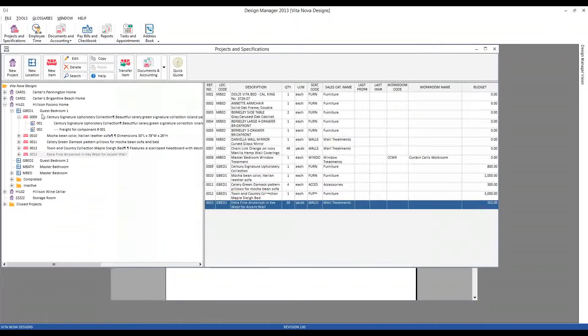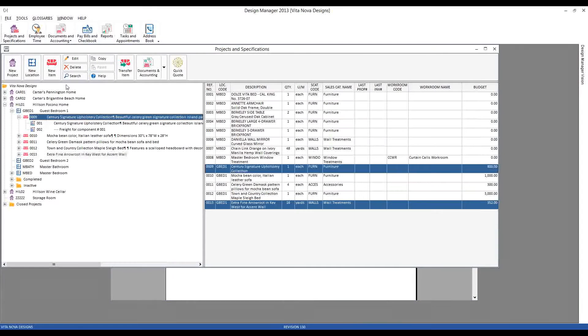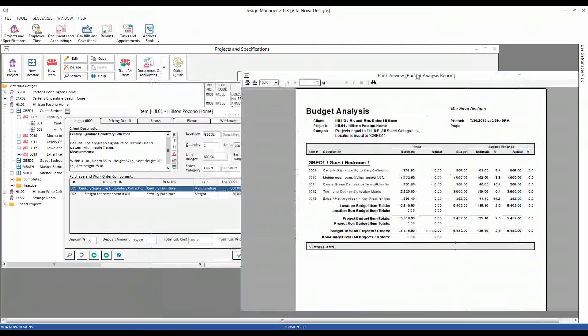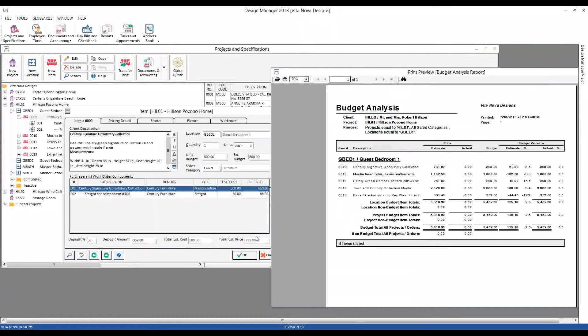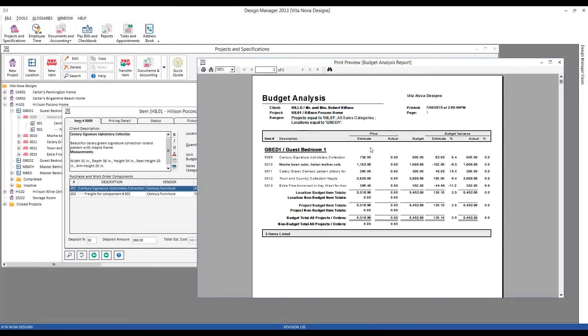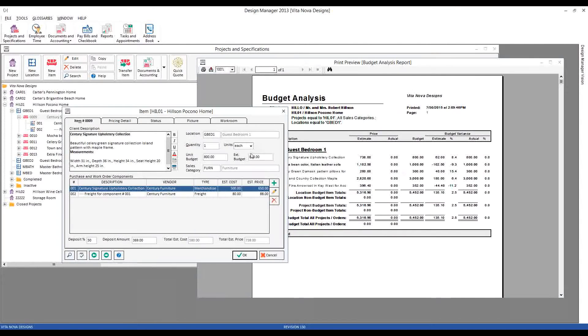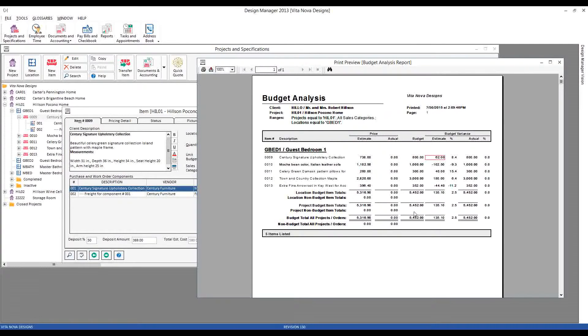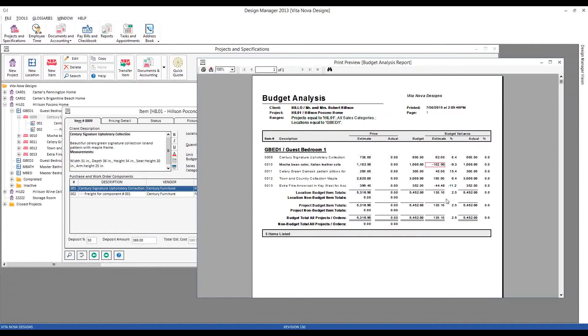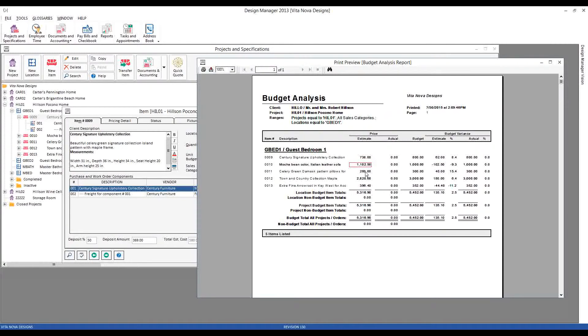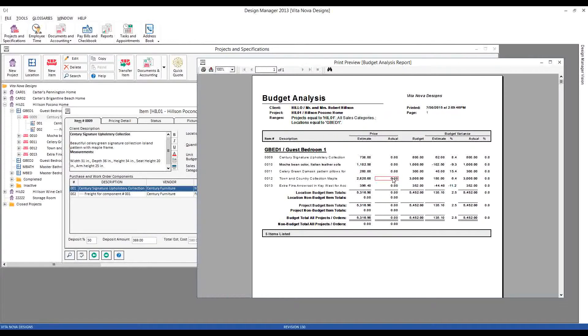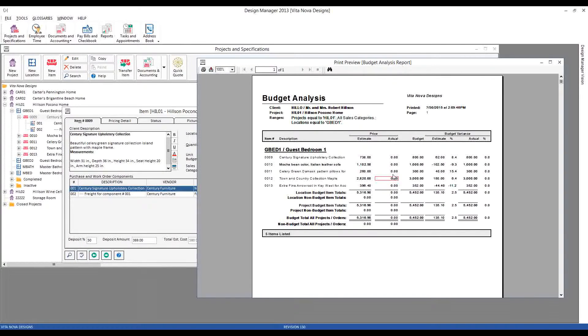Our first column is our estimated price. Well, that derives from the item window itself. As we can see, our total estimated price is $738, and that's where it appears on the report as well. We then have our budget figure, $800 in this example. And we have the variance. Now, any time that the variance is a positive value, that means that we're under budget, while variances of a negative value mean that we are currently over budget or exceeding the budget. We can see that all of our estimated figures are filled in, but we have no actual figures.